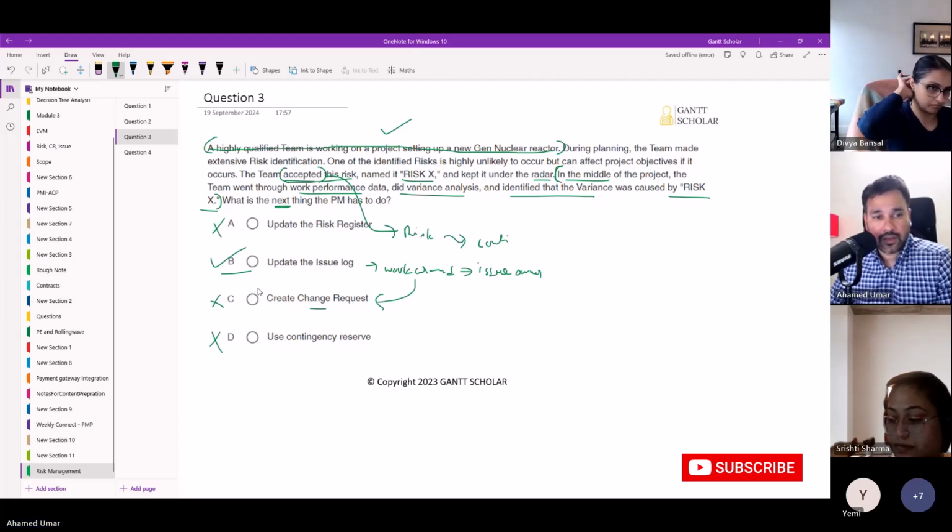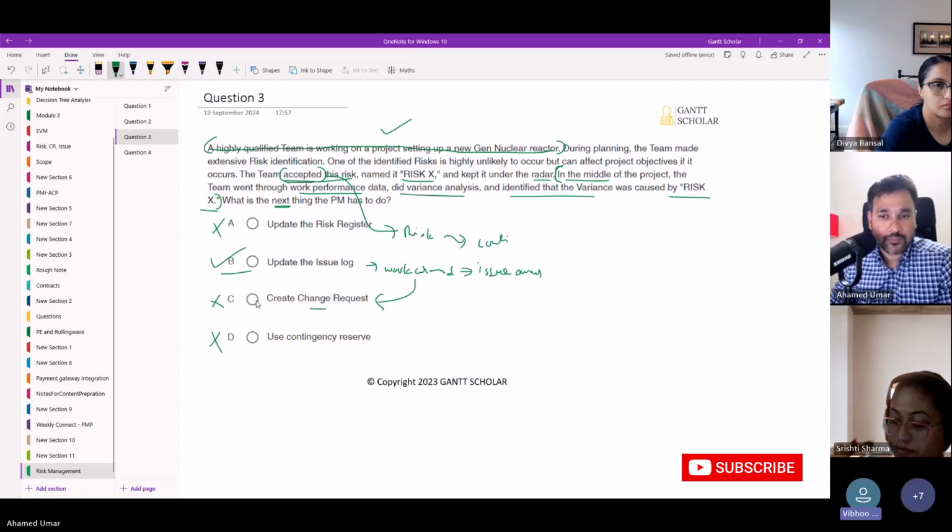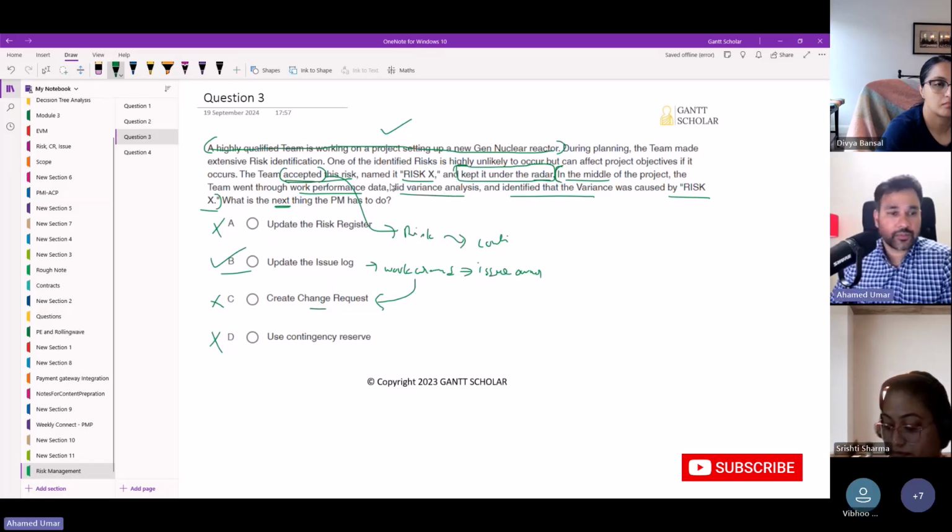Good. Yes, Vibhu, you have a question, please. Yes, sir. I was reading the other day about risk management, and it said that the risks with low PI score would be maintained under a watch list. Yes, correct. So is the watch list a separate document, or is it a part of the risk register? Part of the risk register.